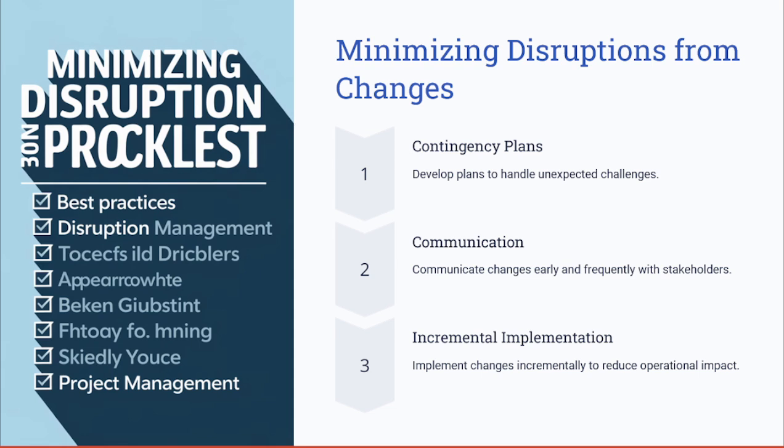For instance, in a telecom network upgrade, rolling out new software on a new infrastructure nationwide at once could cause a service disruption. Instead, implementing the change in phases helps manage the risks, adjust the processes, and gather user feedback before the full deployment.